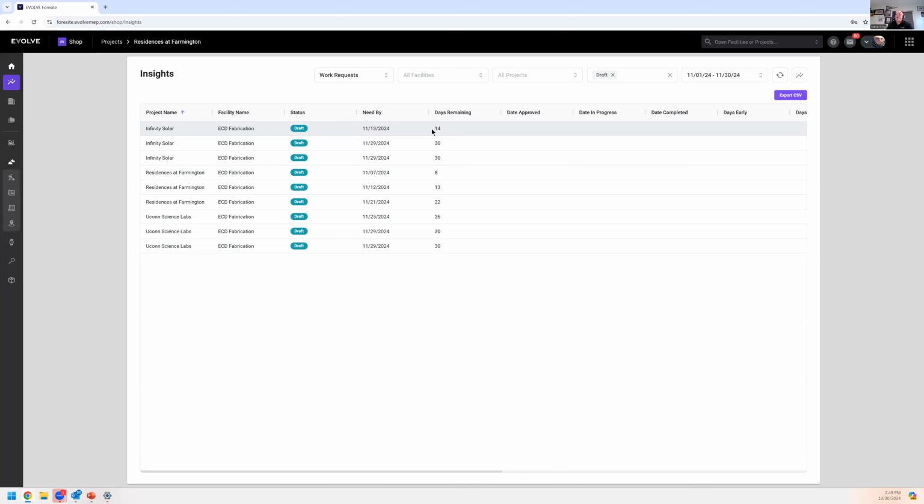And so if you look at your lead time and your lead time's 10 days, you would be expecting this order within the next 4 days. So this is just a way to do fabrication look aheads from project planning that's been done at the project level that has not been submitted. So with that, I think I will